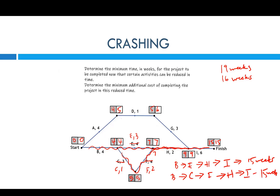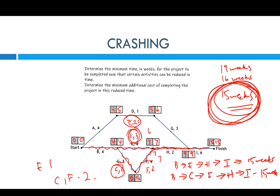This has given two critical paths and reduced it by one. I could have reduced E by a further week — maximum two weeks was stated — but if E was reduced by two weeks to two, you'd get four plus two equals six, but you've still got seven on the other path. So E no longer becomes part of the critical path and it doesn't make sense to reduce it further. That's why you only reduce E by one week.